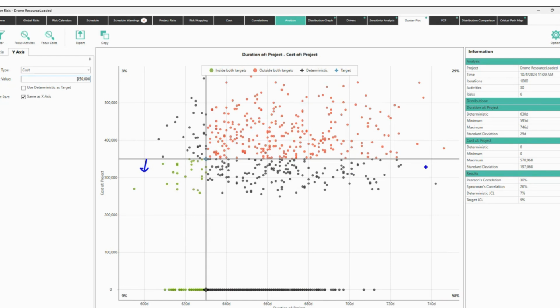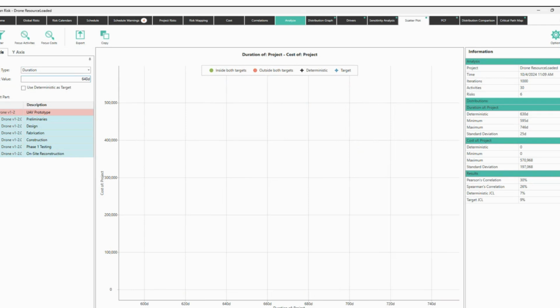So I will have to do all of this, right? Everything below. And it will be 58% plus 9%. So it's 67%. 67% probability is that I finish in less than 350,000, which is this value here, which is okay. But what happens if I said to my customer that I was going to finish in 600, and I don't know, 40 days?